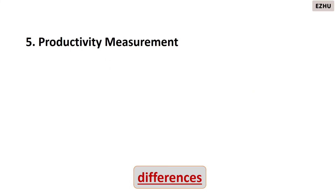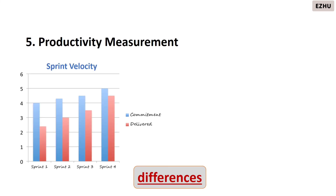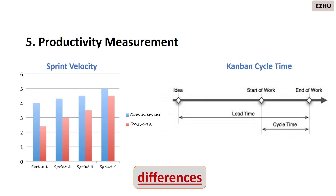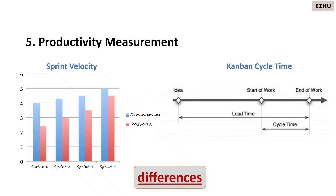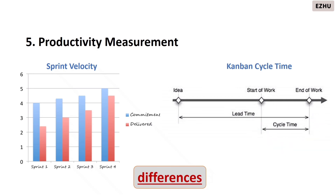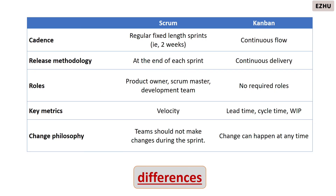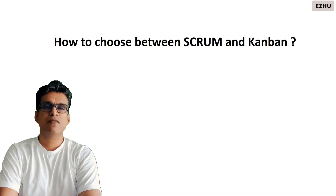Sprint velocity is used for productivity measurement in scrum — it is the number of features committed against the number of features delivered at the end of the sprint. In kanban, cycle time is used as the productivity measure — the time taken to complete a full piece of product. This table shows a quick summary of the differences between scrum and kanban.